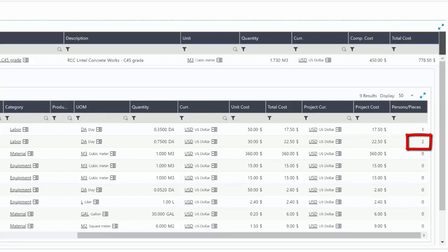That way we can roll that up, and once we start getting our work packages assigned to this, we can start looking at our labor resources based upon when those work packages are scheduled. Now, always, the construction manager at time of execution can decide, I can only really afford 1 helper, deal with it, get it done, or hey, I'm going to put 3 people on this. How they consume that 0.75 days is really up to them at that point.